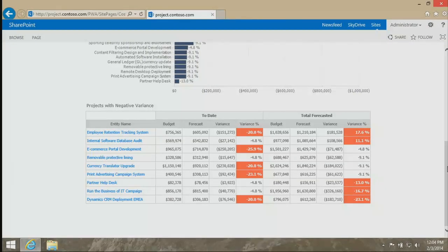And budget utilization, I didn't have a slide on this earlier, but budget utilization is one of the key areas that results in that 46% business value erosion. There's actually 3. Innovation and poor estimating is the first. The second is poor project performance all up. We saw the failure rates and the overspends. And the third is actually budget utilization, where you fail to get through the projects you planned to. And the projects in this third bucket tend to cause surprises in Q4. So you've got to keep an eye on them.